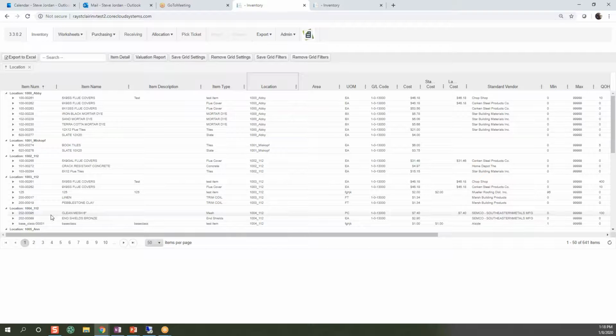So you have a lot of flexibility with these locations. But for the most part for today, let's just say the location is a job location and this happens to be the job. Well, I can now take from my master inventory list or my master item list and transfer and estimate the items into that location.